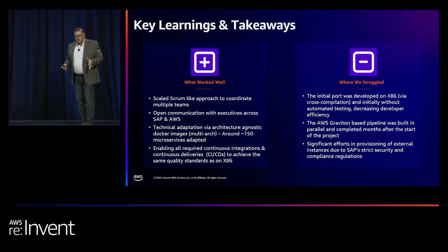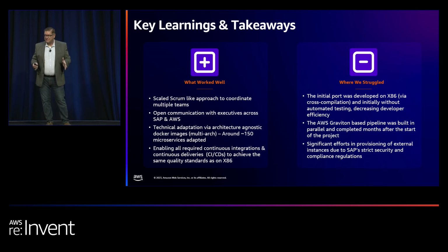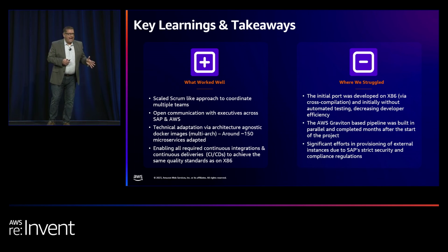So where did we struggle? Again, not so much from a technology perspective, just more of an approach. First of all, our initial port was done very early on, prior to even having those build pipelines available. Because of that, there was some decreased developer efficiency because we had really aggressive timelines. We actually ported a lot of the aspects, a lot of the database and things like that, before a lot of that had been done.